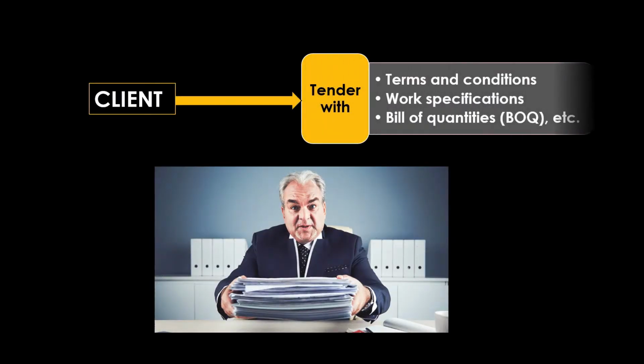Client floats a tender with eligibility criteria, terms and conditions, work specifications, and bill of quantities or BOQ.